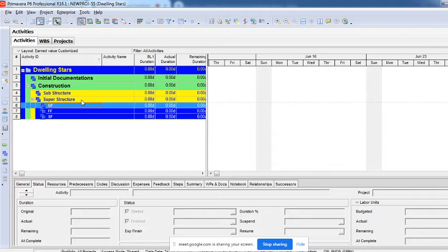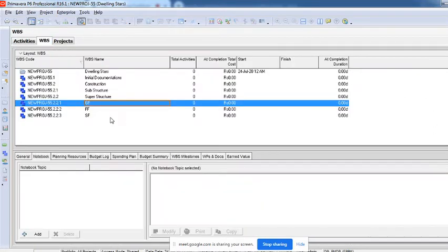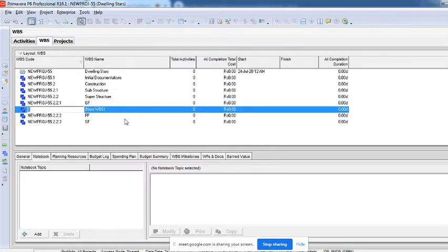Scope. So until you get a single scope, when I say concreting, it is only concreting. When I say steel fixers, they have only a single scope of work. So until you get a single scope, you will have to keep on breaking down the scope of the work, and that we call a WBS. The moment you get a single scope, that is called an activity, right? So for example, if we have to break this down again, I'll have to go to this option, click on this ground floor, again click on this, and then you can see there is something called column work.